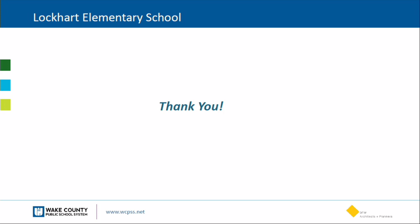But the other thing is, we have to get from the zigzag building over to the gym, to use it for the media and PE. So we'll work with the CMAR to construct a covered path to get us safely over there and back again, so the kids are protected from the weather, and from any potential materials falling off the building. It's not under the building, so we're outside the construction zone, but things have a tendency to float in the wind sometimes, so we'll make it as safe as possible.